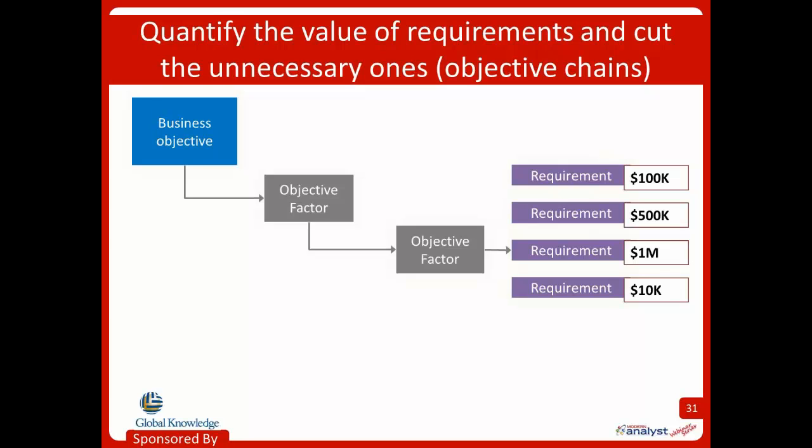So what we do is we evaluate each requirement to determine how much it is going to contribute. And I will suggest that you group requirements together so that you're only doing this comparison on 10 to 20 things at a time. You don't actually have to do it on every functional requirement. You can group them and do it on things like features. The other thing that's important is you don't have to be precise. You're really just trying to get yourself to an order of magnitude. So it doesn't matter if it's 9,500 or 10,000. The idea is that it's roughly a $10,000 thing.